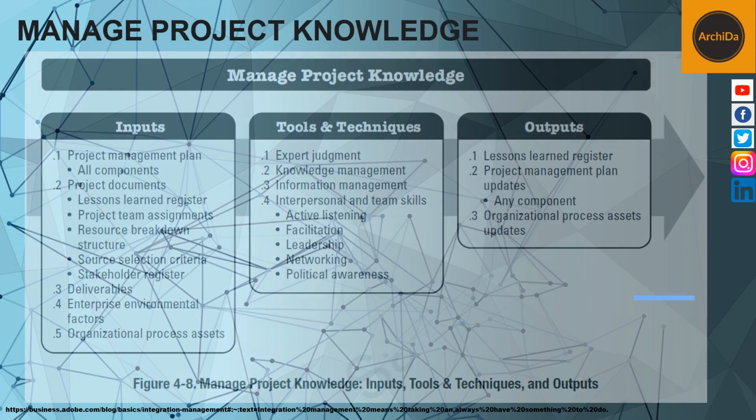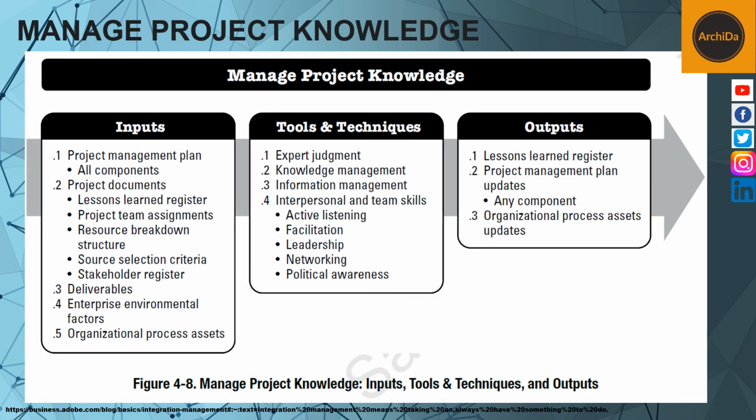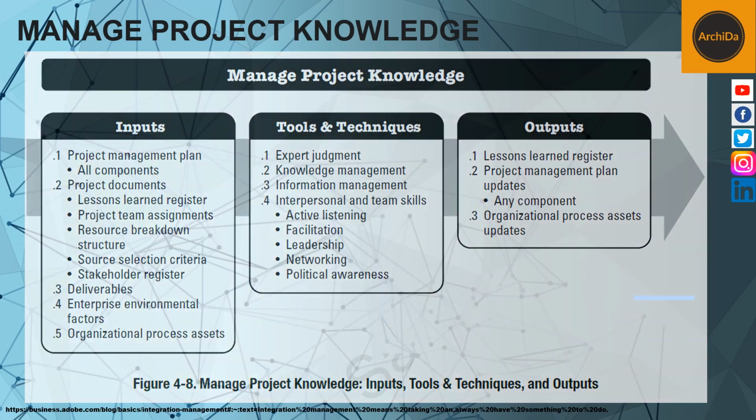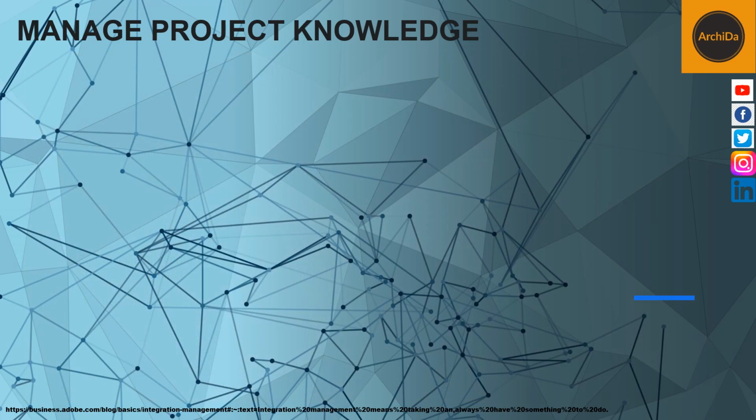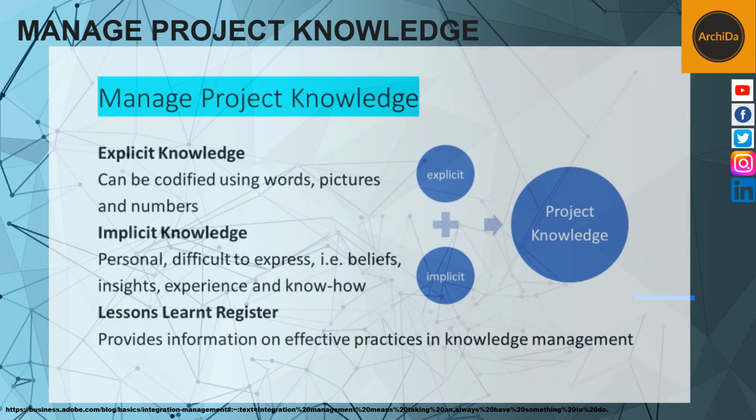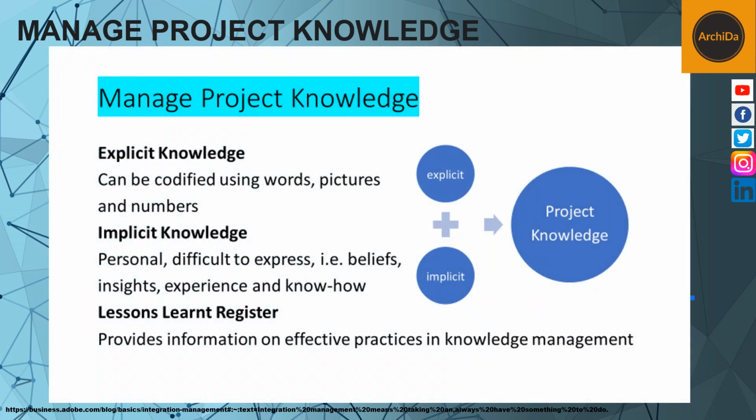Manage project knowledge. What your teams learn as they work on projects can be an invaluable tool for the future. Capturing this information is an important part of the project integration process. Make the most of the information available to smooth out the execution. Record anything new you've learned in a lessons learned register so the organization can benefit from learnings to make efficiencies on future projects.